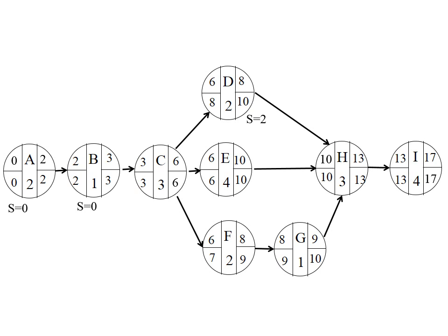You know, the earliest you can begin is 6 and the latest you can begin is 8, and still you will complete the project within the specified period. And the difference is 2. 8 minus 6, or 10 minus 8. Okay.